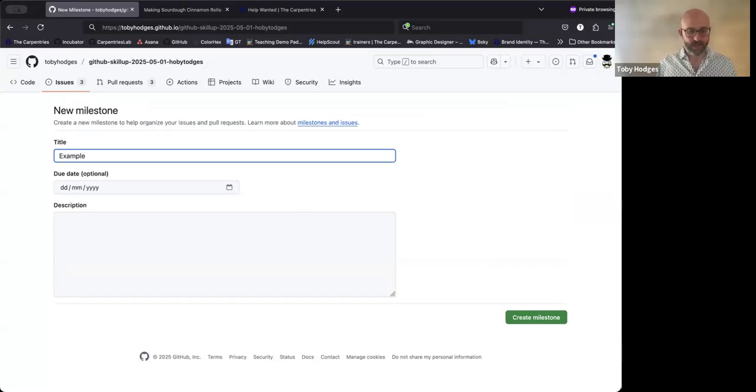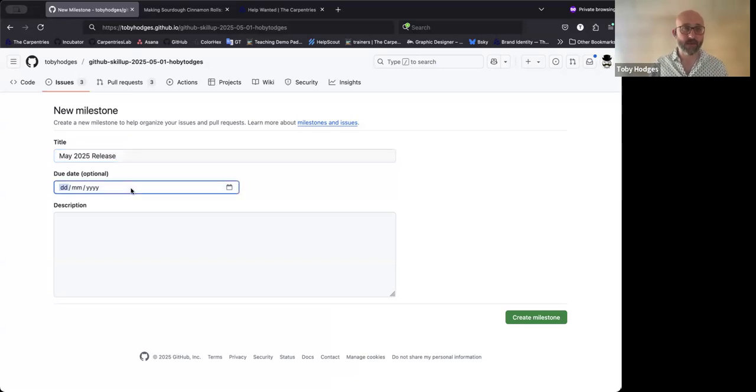I'm going to put, no, let's go May 2025 release as a name for the milestone. And what we would be doing here is trying to collect together all of the issues that we want to address before the release that we want to make of our project, in this case, our lesson in May.